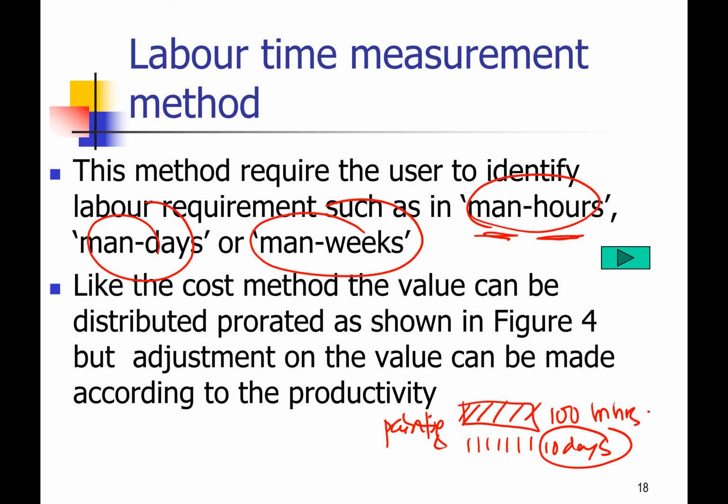But let's say in reality, you only manage to do 8 man hours per day. So what is that telling you? Well, you can simply calculate, no, sorry, 10 minus 8, 2 per 10, meaning you are running late around 20%.